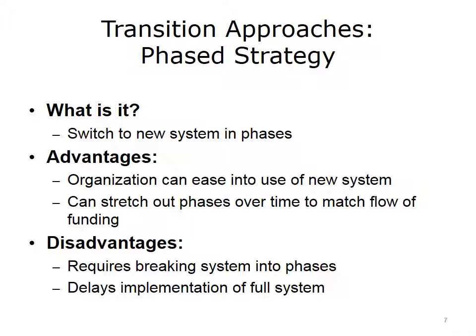One suggestion is to follow the patient flow. If the patient is admitted into certain units or areas and discharged from other areas, then those areas should come up together. That way, one unit does not have to deal with working in both systems. An example is that you may want all of your surgical areas, both pre- and post-surgical units, to go live on the system at the same time.